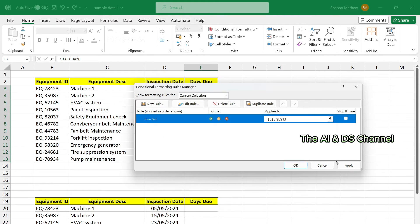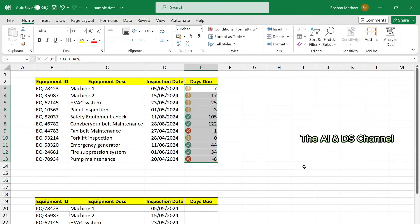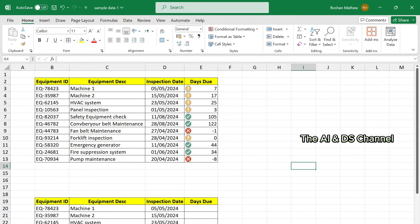OK. Click apply and then OK. So now everything above 30 days will be green color and within 30 days will be yellow and the tasks which have passed the date will show as red. So this is one method of creating a deadline tracker in Excel. Now let's look at the second method.